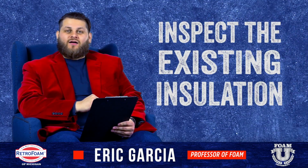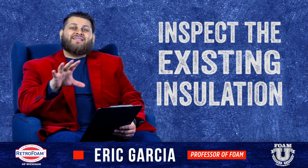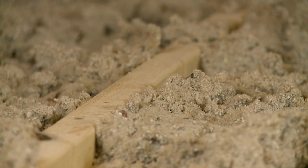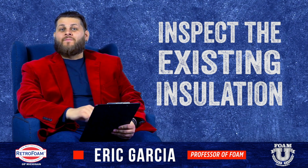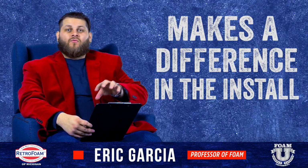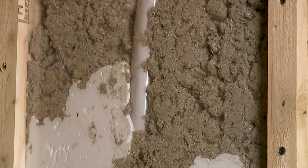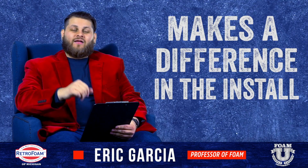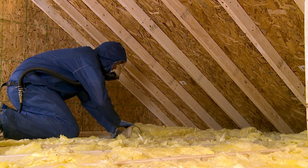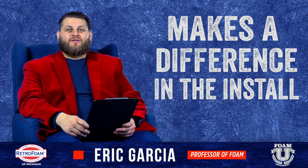The next thing we're going to talk about is that the person that comes out for that visual inspection can check out the existing insulation that's in the house. Keep in mind that there's fiberglass or cellulose in any area, from the walls, attic, crawl space, doesn't matter. It will make a difference during the install process, and it does make a difference on what material and what tools that crew needs to bring. So again, you need that person to come out, actually see what's going on, get hands-on with the home or the building and see, yes, there's fiberglass here, so be prepared to work with that. Those little differences will save a lot of headache for both you and the install crew.